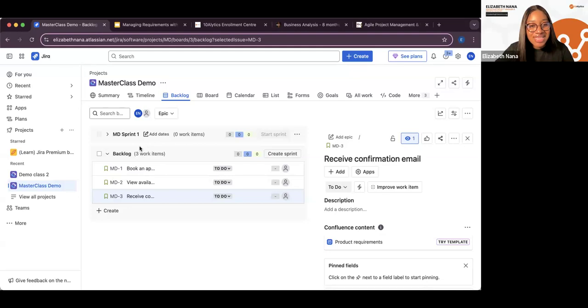All right. So Tony says, as a patient, I want to receive email or SMS to confirm my appointment. Wonderful. Adedayo says, as a patient, I must be able to receive a confirmation email. If it says, as a patient, I want to receive a confirmation email so that I can tell if my appointment is successful. Wonderful. That is the exact format. As a patient, I want to receive a confirmation email so that I can tell if my booking is successful.